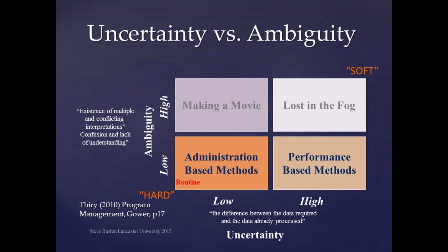Alternatively, a quest-type project draws on a management approach that defines and measures performance of the project team in achieving the project objectives. As a project is defined in terms of cost and timescale, as well as achievement of its objectives, performance must be managed by balancing all three of these parameters.